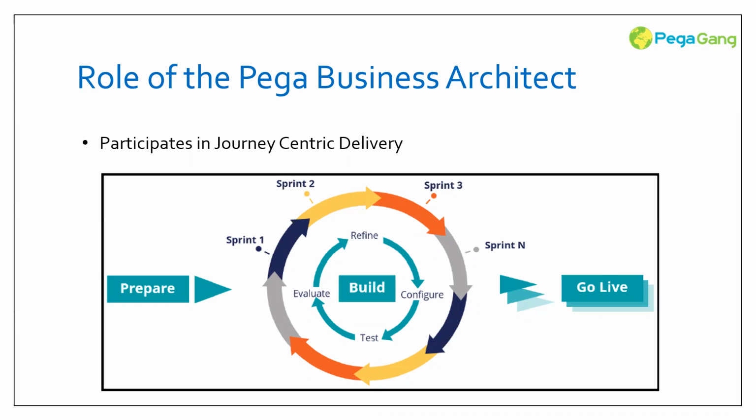In that go live, the code which is built and tested by the development team will be moved to quality testing. Once the quality testing is done, it moves to the go-live phase, where the customer will perform the testing, and based on the results, there will be a review panel to decide whether the application is good to go or not.